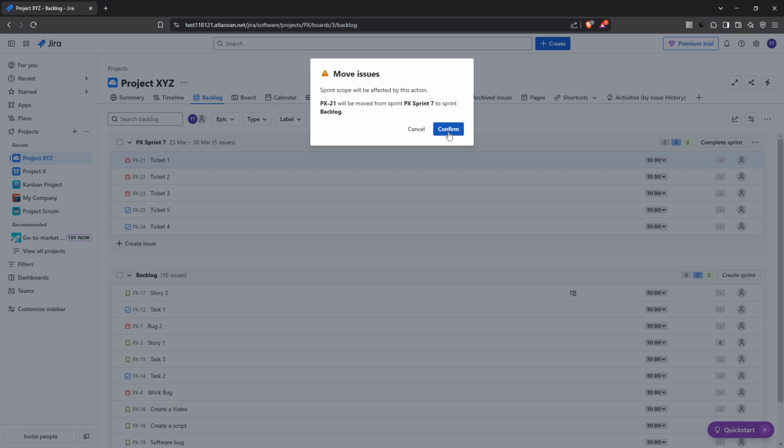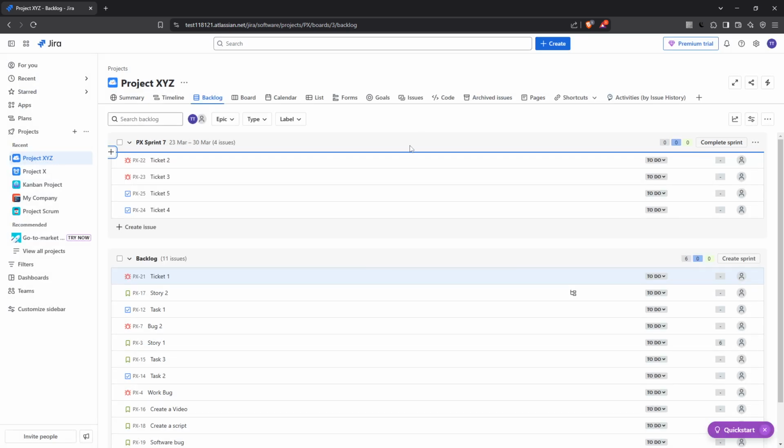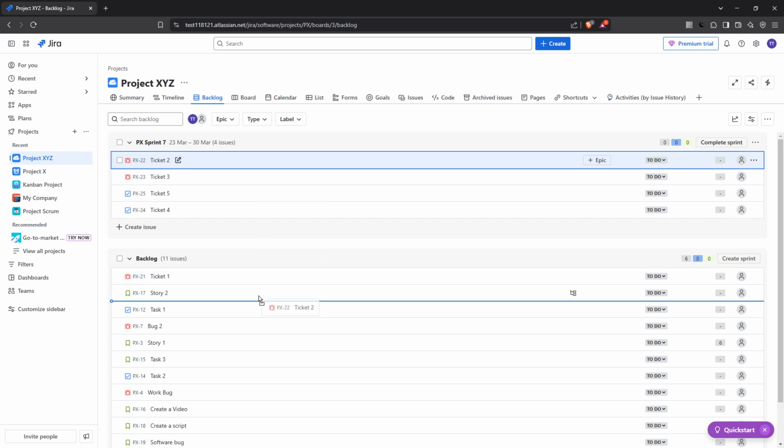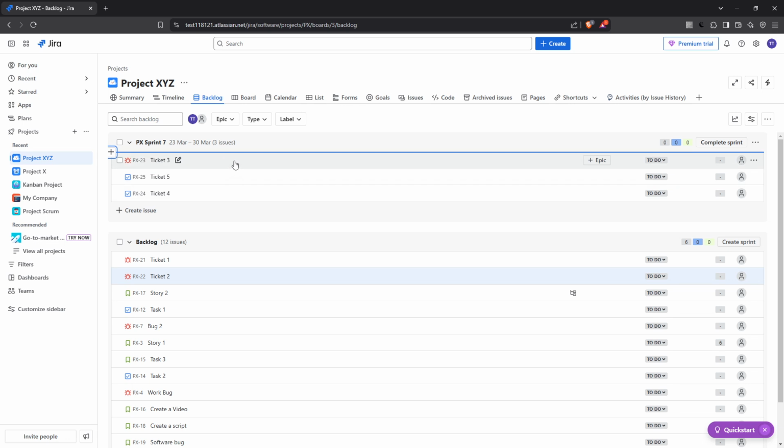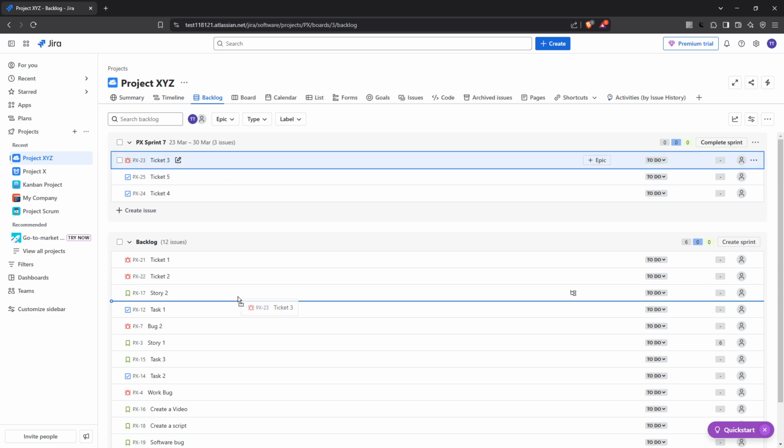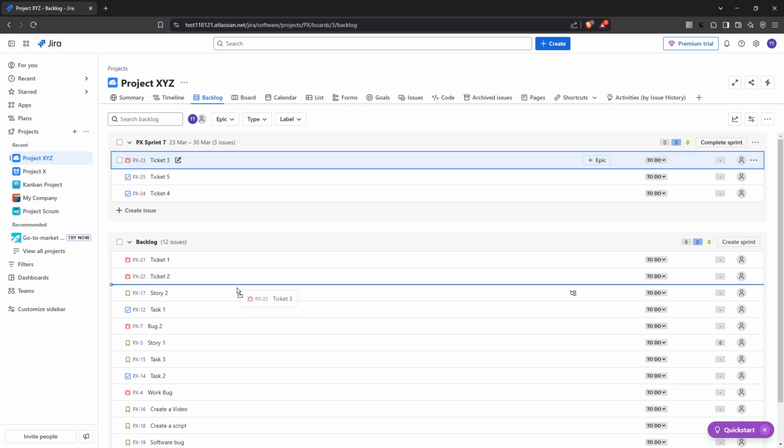for later. One helpful tip while doing this is to make sure you're clear on why an issue needs to move to the backlog. Maybe it's due to reprioritization or unexpected roadblocks. Whatever the reason, moving tasks to the backlog helps you keep your sprint focused and manageable without overloading your team's capacity. And there you have it, a quick guide to moving tickets to the backlog in Jira on your Scrum